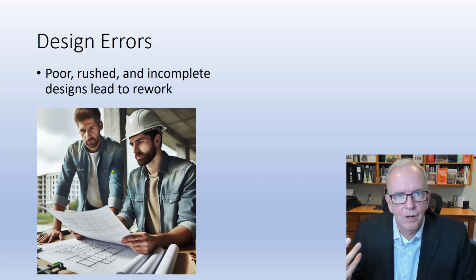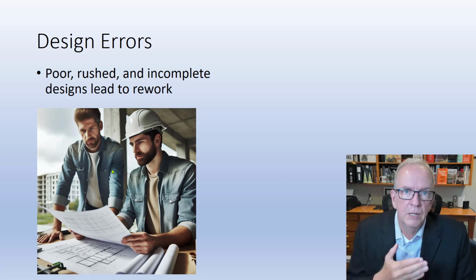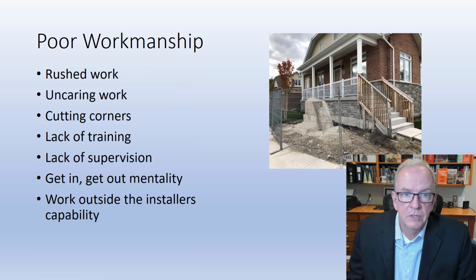Contract models are much better where we get more collaboration early on in the project. So better than design-bid-build would be design-build, construction management, and cost plus. Better than those would be integrated project delivery. But definitely poor, rushed, incomplete designs. Your biggest opportunity to save is in the early design process. That is where your biggest opportunity is to save.